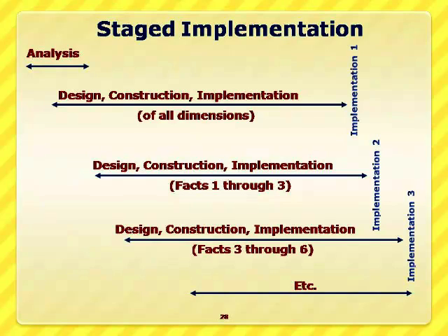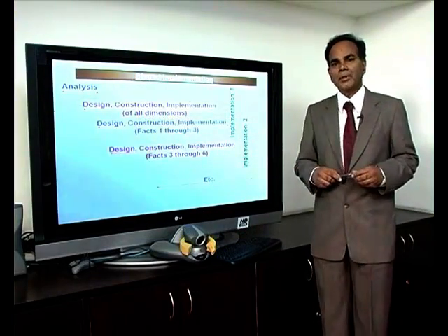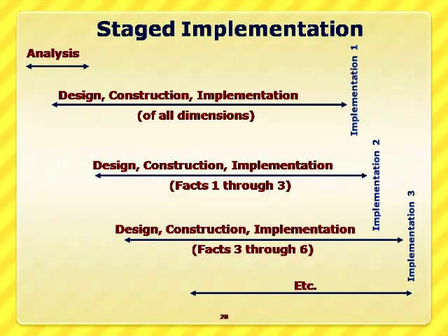Therefore, the probability of success of the project is very high in a stage implementation. This methodology especially suits very large organizations. We have seen the traditional methodology and the staged methodology. For small organizations with small requirements, the traditional model can be applied, whereas in big organizations with large data warehouse requirements, stage implementation is the suitable one.